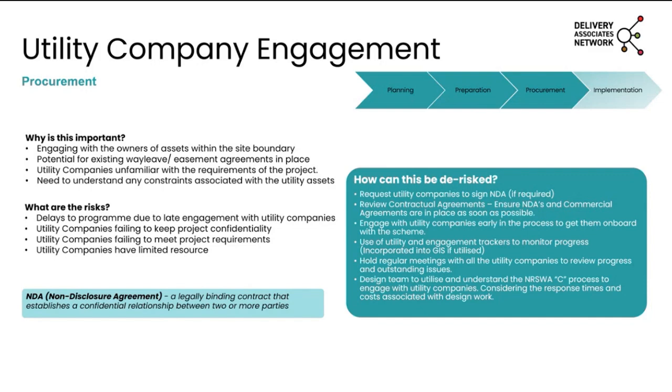I have worked on projects where they are confidential and non-disclosure agreements have been required. This is just something to be aware of in terms of the project. If an NDA is required with the utility company, you need to get that set up as soon as possible. The same goes as well for a utility search company. If you do engage one of those, you may well need an NDA with them.